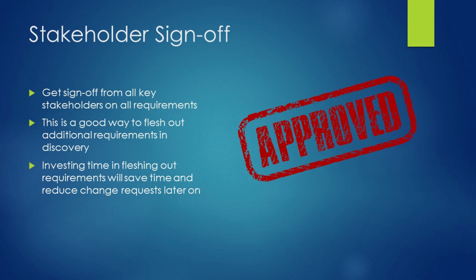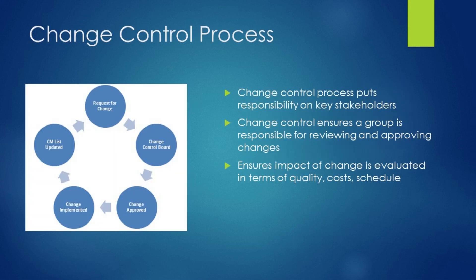An added benefit of having stakeholders sign off on the requirements is that if they come to you while the project is in the development phase and try to expand the project's scope by adding requirements, you can remind them of the document they signed off on previously, and remind them that they can't change the project's scope without impacting the timeline and the cost of the project. Number 3: The change control process. A good change control process puts the responsibility on the team leading the project to approve all changes to the initial scope of the project as a group.